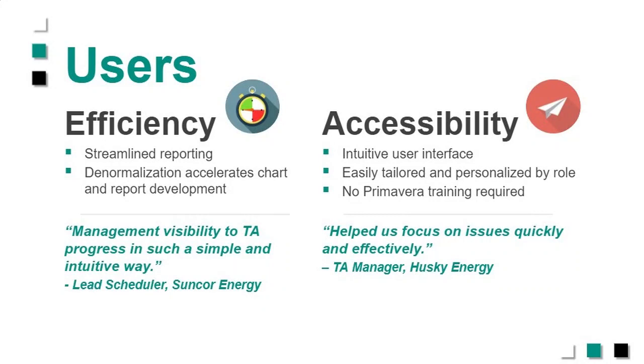So it gets the issues in their hands quicker, like in those green ups, okay? So one of the things Marilyn was showing you is if you have green, red, and then green, you know, why is the red in the middle? That doesn't make sense. So it lets you know right away, is there an update missing? Or did I update later tasks without the earlier tasks finished? Like, what is going on here? Okay, so that's really important for you to be able to pinpoint problems, okay?